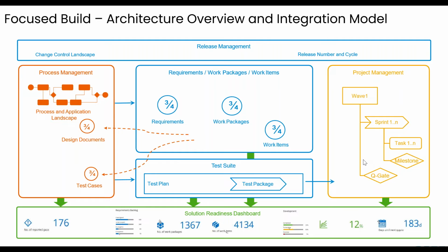In most cases, what we see is 3 to 4 week sprints within SAP. The goal would be that we'll have at minimum 2 to 3 sprints within each wave. And within each one of the sprints, we'll have separate work items that we'll assign to that sprint in order for us to be able to deliver those, build, test, and do a show and tell, and primarily park them until we are ready for that go live.